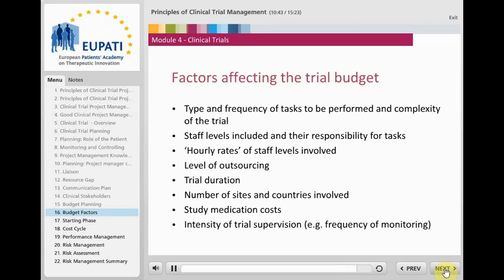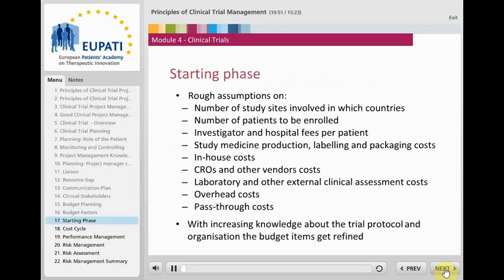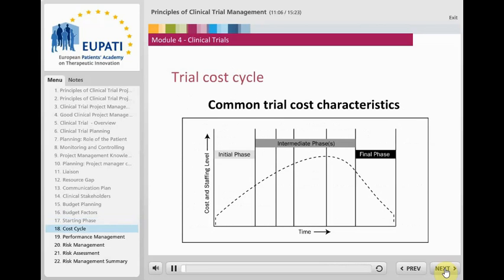Trials in some areas of indication are more expensive than others, often because they require more expensive technology or treatments. Typically, cancer or stem cell trials are more expensive than trials in frequently occurring infectious diseases or depression, where most tests consist of questionnaires. When starting the planning process, only a very rough cost estimate is possible, but with increased knowledge about the planned study the project manager can refine the accuracy of the costing. Costs increase slowly at the beginning of a trial, then continually rise until the trial is in full swing, before dropping sharply towards the end when investigator payments and service provider fees have been paid. Changes to the originally agreed plans are likely to happen, but it is important to envisage the required changes early on, as later changes are more expensive and harder to address.